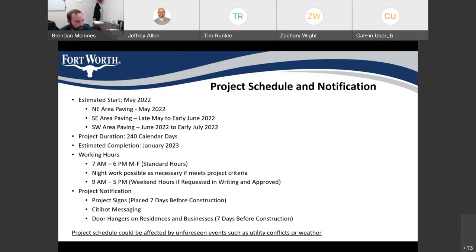The project has a duration of 240 calendar days. A lot of that time will be when we get into downtown doing the ADA ramps, moving through there. If we run into any challenges with the paving, you may see those timeframes extend out further than projected. We have an estimated completion of January 2023. Working hours will be 7 a.m. to 6 p.m. Monday through Friday. Night work will be possible as necessary if it meets project criteria. The contractor will be allowed to work 9 a.m. to 5 p.m. on weekends or holidays if requested in writing and approved.